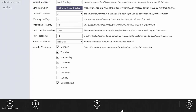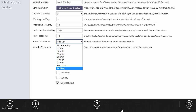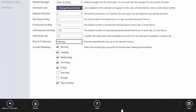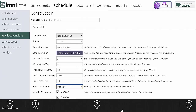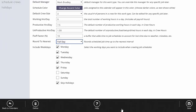Round to nearest means you round your scheduled days to the nearest interval — as little as five minutes or up to a full day. For larger construction projects you'll probably want to round to a full day; for smaller enhancement work you might round to an hour. Include weekdays sets the days you schedule work on by default — Monday through Friday for construction work, with no scheduling on holidays. When scheduling a specific job on a tight timeline you can add Saturdays; these are just your defaults. That covers construction scheduling: color, hours to apply to the schedule, and the days you work.